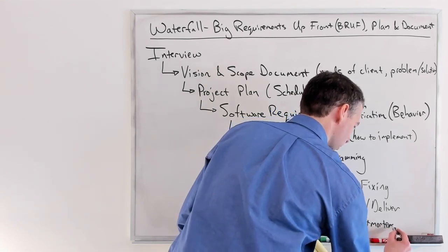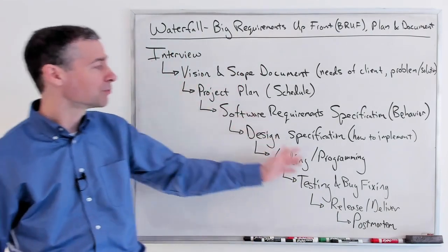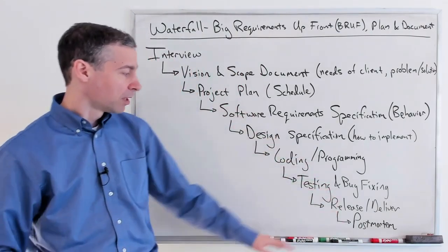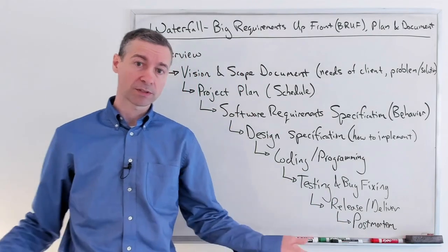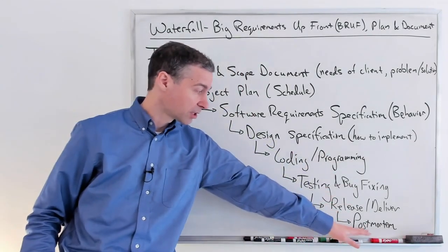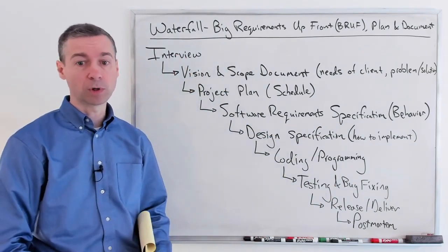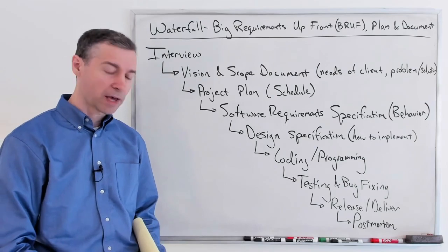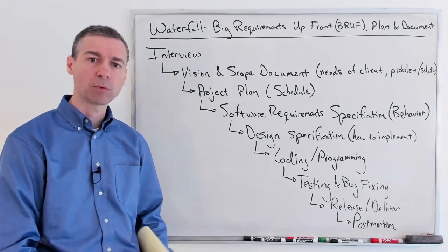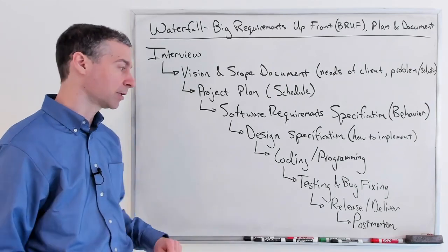After that, everything wraps up with what is traditionally called a post-mortem. There are a lot of people who don't like that terminology because it's like after the death. We shouldn't be dying from this process. Just a quick summary, it's kind of like a big retrospective, but it's for this whole entire gigantic project. You might very well spend a full day or even more trying to diagnose and understand what went well and what didn't go well with the project so that the team can learn from that.